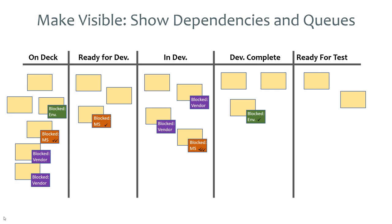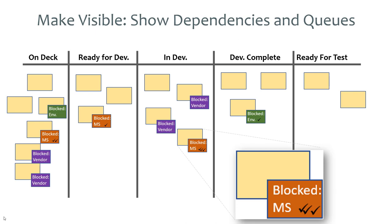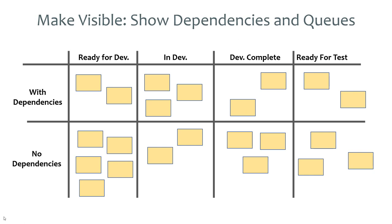Here we're seeing a Kanban board where we start marking our blocked issues or where we have dependencies. At stand-up every day, team members say they would like to work on something but it's blocked by a certain group, and they put a tick every day that they discuss it. So we're getting information not only about blocked items but also the duration of blocked items — that's what the little tick is showing. Another approach would be to separately call out which work items have dependencies, showing a swim lane on the Kanban board for items with dependencies versus those without.